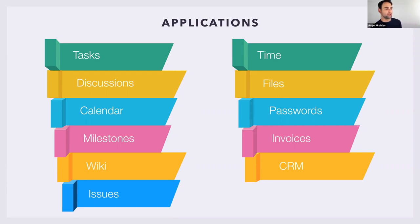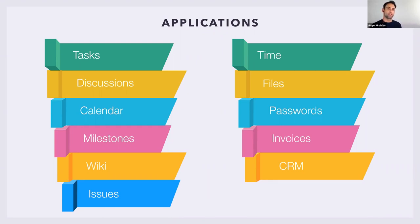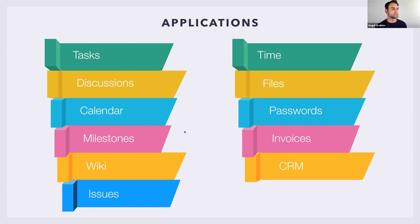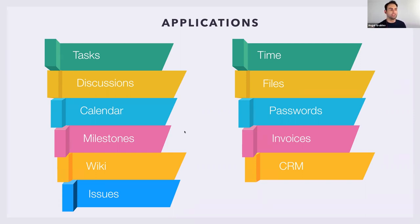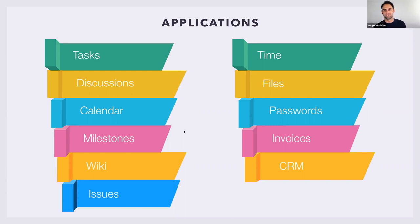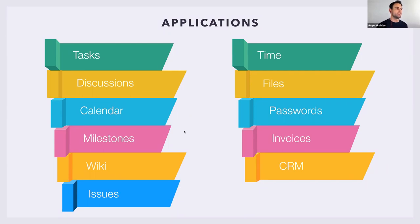Then we have the issue tracker. It has a few specific features that make it unique from tasks or milestones. You have a special option to select a closer for a task. If you have one engineer performing the issue and then a manager or testing guy who needs to verify it before it gets completed, you can set somebody to actually be able to close it and not be the person working on the task. The issues also allow you to embed a little widget in your website that anyone from anywhere can open up. They can report any kind of issue they're having with your page. You can respond to their submissions by email or via the application. Great way to get feedback or issues.